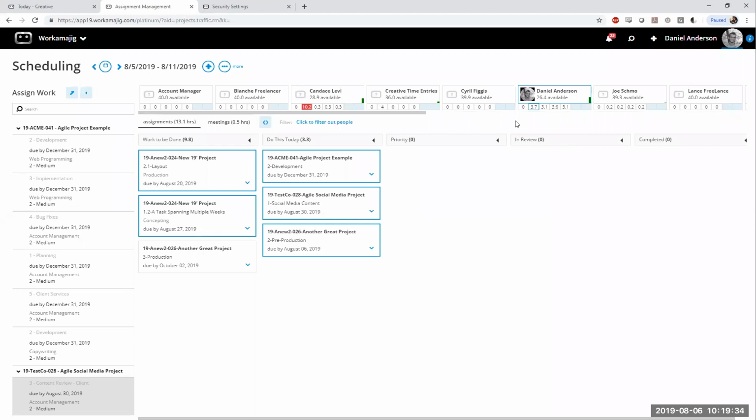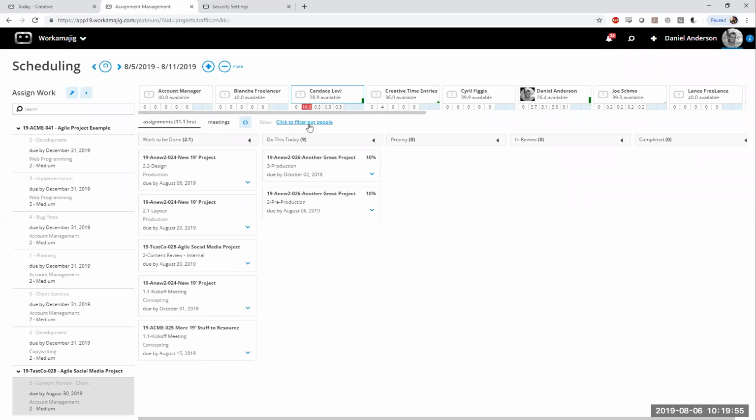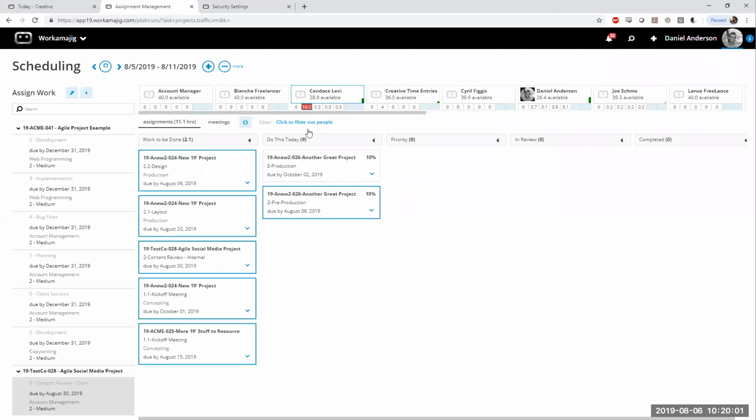So this page is primarily concerned with the tasks that a user is assigned to and the statuses that they're placed in, but we do still try to provide detail on the allocated hours for a task here and how those break out. And we do still provide warnings on whether or not a user is exceeding those. So you'll notice here with Candace's on this Tuesday, she's got 10.2 hours. This will actually come up in red just to show you again that, hey, she's actually over allocated for this period here. On this particular day, we may want to kind of reassign one of these.